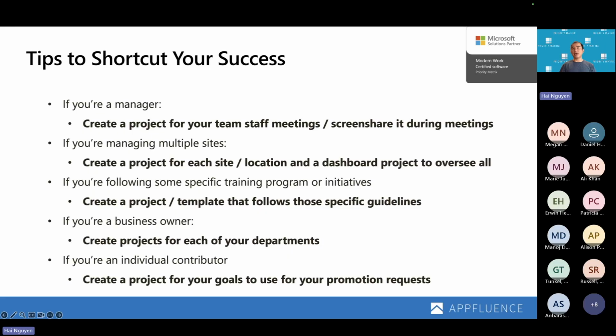And so you can actually create that in Priority Matrix, and then our software lets you turn that into templates and Excel files and CSV documents that you can use over and over again. The cool thing is that when you onboard a new customer, you launch from your Priority Matrix template, and Priority Matrix will automatically set the start date for you and then propagate the rest of the start dates and all these other priorities automatically.